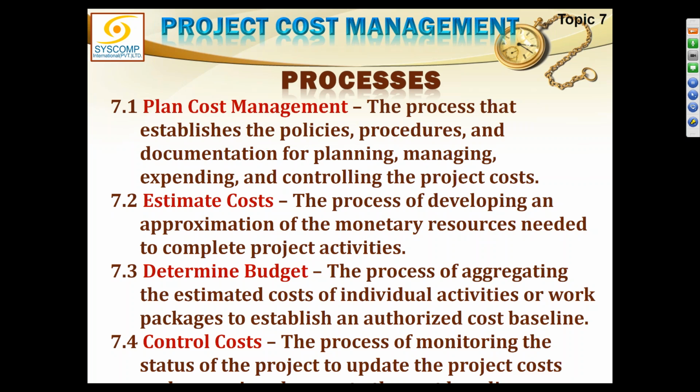The baseline shows how much money should be spent at what time in the project, exactly how much money will be required at what point in time during the life of the project. How the money should be released is another subject, which is called funding reconciliation: how much funding should be reconciled to the project at what stage. You see, the need for money in the project is a continuous need. Money is required all the time, consistently throughout the life of the project.